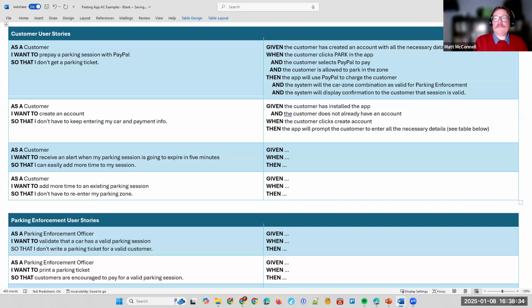All right, so I'm going to add a note here because it could be a week. One of the things that I kept finding over and over again with my last team was we do refinement of a story in early January. The sprint where we were doing the refinement might end at the end of January, and then somebody picks up this story in the middle of February. It's been 4 to 6 weeks since we last looked at the story, so nobody remembers the details, and that's why I think it's great to capture this stuff here.